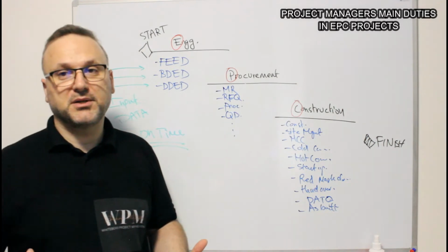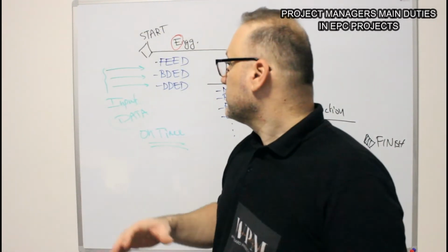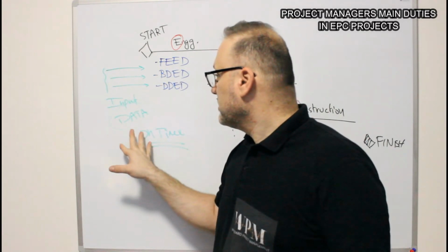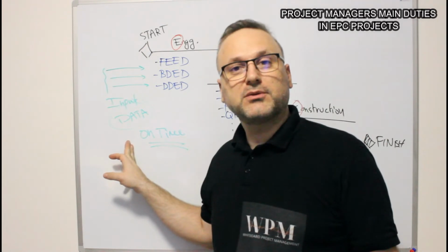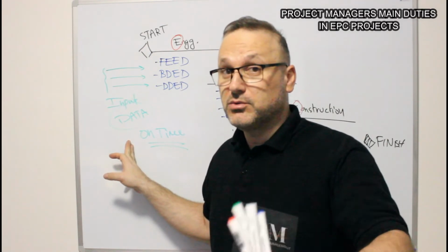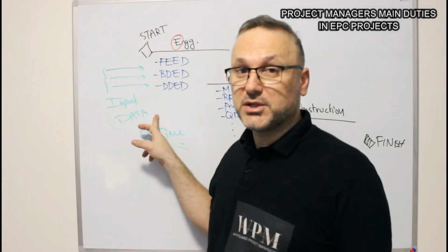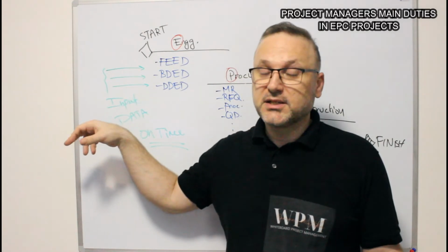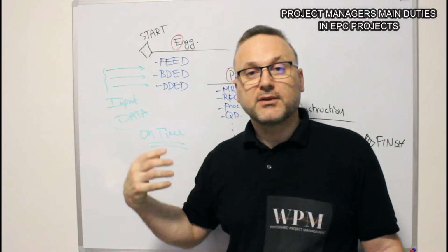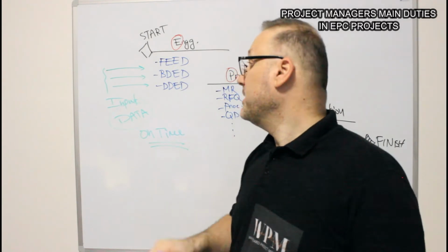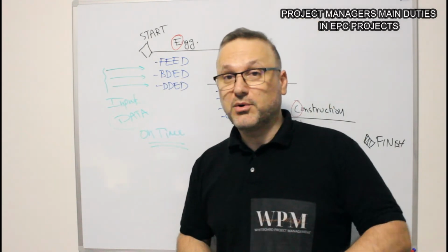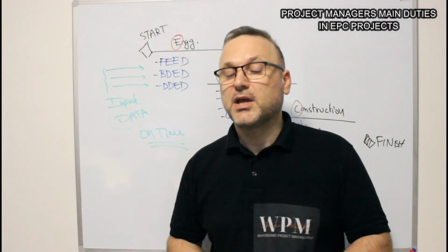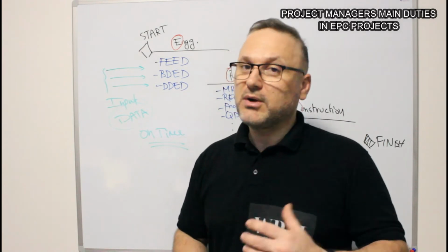You as a project manager cannot execute the project if you don't have those data. Some clients tell you, okay, I cannot provide you this data now. You can make the decision and tell him, okay, I can suggest this data from my previous experienced projects, and we can use this data, and then we can issue the basic documents on hold with other conditions on hold. So you can reach an agreement between you and the client.